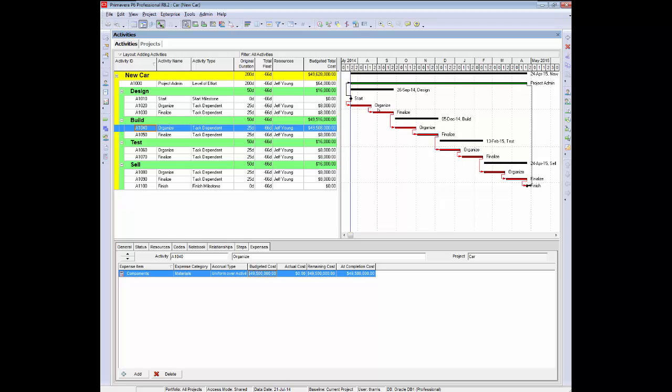What we also might do is look at the way the activities are organized at the moment. And they are all in a finish to start relationship, each activity with its successor. So there may be some scope for doing certain activities at the same time rather than have them all in a sequence. And so that's what we'll consider in the first instance. So it has to be logical, and it has to be realistic, the solution that we come up with.